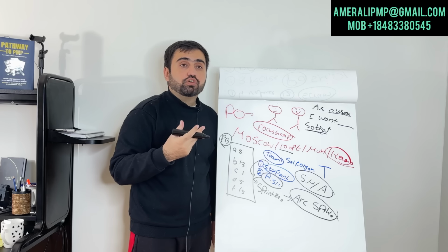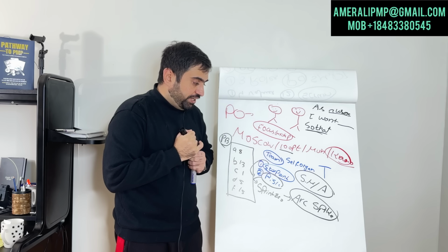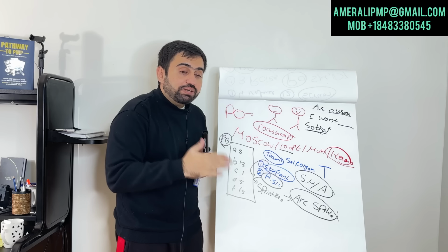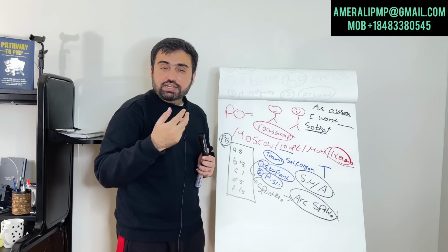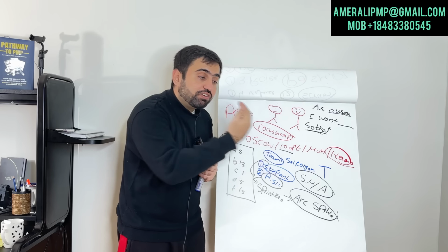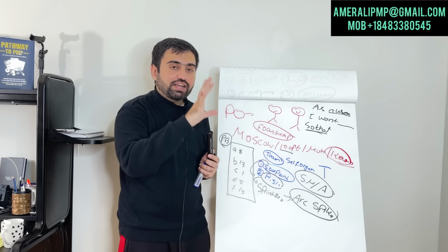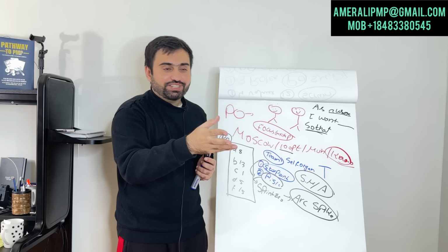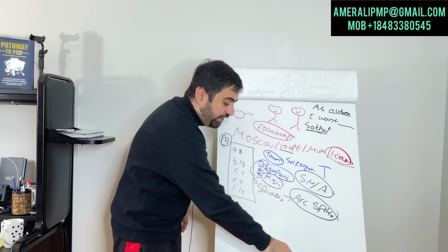What do I mean by proof of concept? When I say proof of concept, I mean: can I actually complete this thing? Is it even possible for me to complete that thing? It's like an analysis, like a design test, load test. Can we even do that? Like you are going on a trip, you want to make sure that you do have all the tools to go there. Architectural spike. The entire Scrum is basically divided in this way.